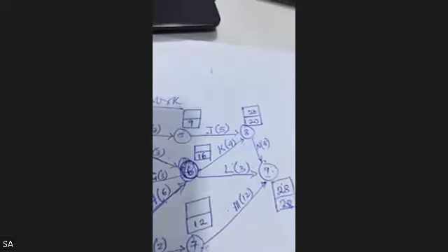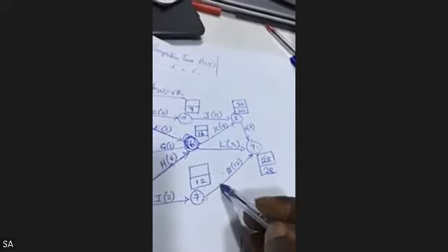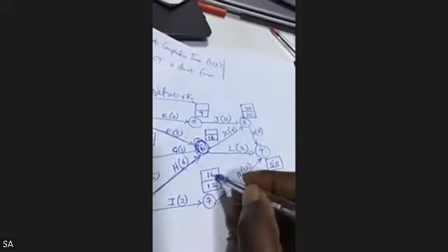It's very, very important you take note of this. If I'm going to node 7, where is node 7? It's 9 to 7 now. So that will be 28. 28 minus 12 gives me 16. So I have 16 here. We are going backward.